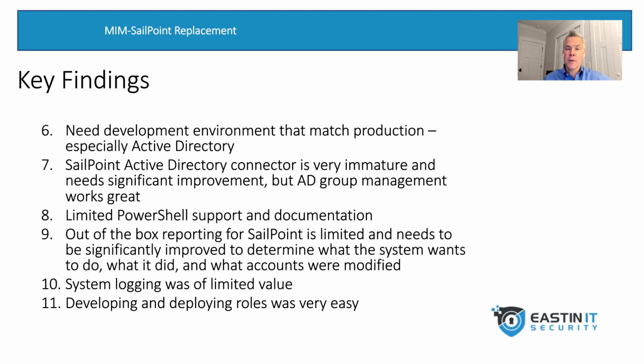Number one, especially if you're using the Access Insights module, you want the data in your HR system and in Active Directory, and of course Epic if you're a healthcare organization, to look as closely as possible as it does in production. Specifically, you can use that data to help derive your roles and try it out so you're not playing in production. Because if you make a mistake in production, some very unexpected things can happen, which unfortunately happened with this client.